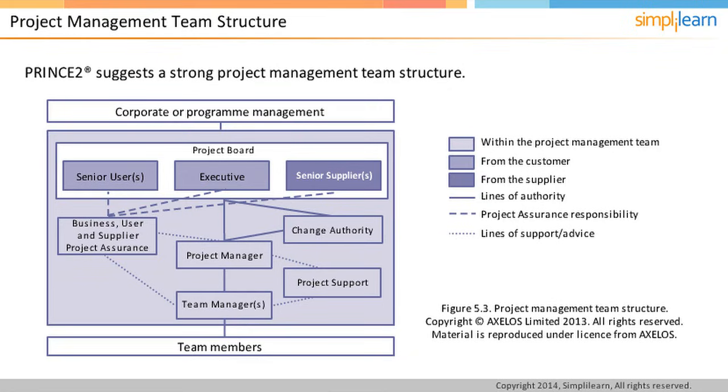effective project management, along with the roles and responsibilities. The reporting structure and authorities for various activities should also be defined. PRINCE2 also gives guidelines on which roles can be combined if needed. The executive, representing the business viewpoint, and senior user, representing the user viewpoint, roles can often be combined.